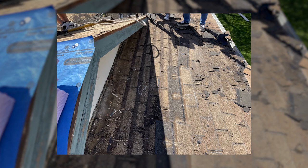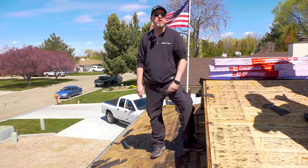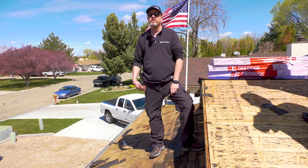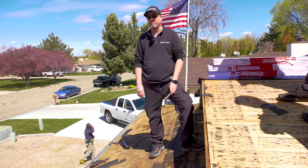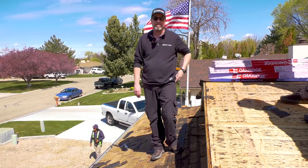You want as many pictures as you think you're gonna need, because as soon as you're done talking to your homeowner about the two layers on the roof, you're now gonna have to call the insurance company and talk to the adjuster about the two layers on the roof. And you're gonna send in pictures so that we can get this supplemented for you.